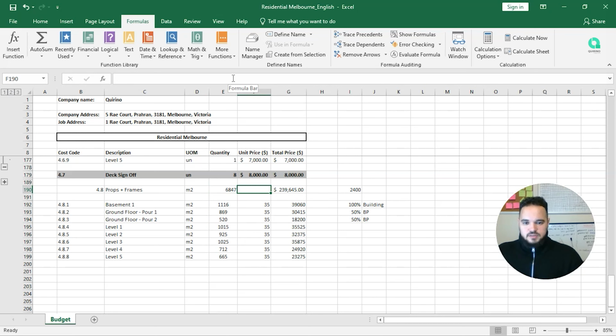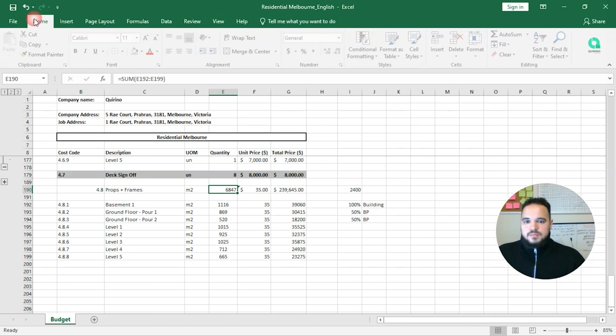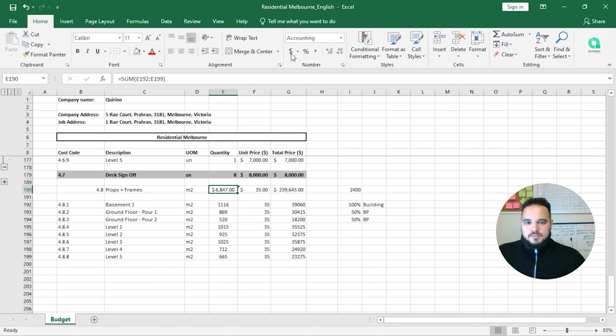Now, to have the price per square meter in our offer, we will calculate the whole square meter, and then, well, it's going to be 35, right? 35, just double checking. There we go, $35 per square meter. No, accounting general. Good. So remember, you are charging, this price will be for 6,847 square meters, but you will provide 2400 square meters of material. Okay, basically with 2400 you can build 7000, right? Basically this.